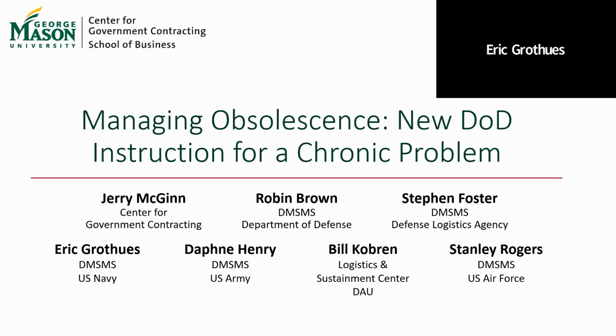Second, a risk-based process is key. We do the same thing with counterfeit management, which is related. Instead of looking at my whole bill of materials across all those millions of systems I talked about, now we do a risk assessment. We look at which ones are going to bite us in the tail, and put my resources on those. Not saying that the other ones won't get us, but if I focus on the big high-dollar ones and the ones that we know are at risk every time of going obsolete, then we can put our resources on those items. So having a risk-based process, where before we just said, hey, everybody manage it, makes it much more realistic and lets the PM put his resources where he needs to.